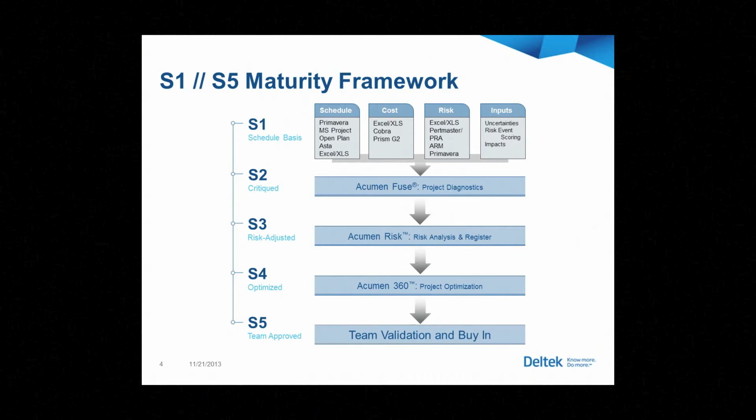Every month as you're statusing, or week as you're statusing your schedule, you can always bring it in and very critique, run it through, get a schedule score, understand risk, update your risks, and see what those impacts are on your schedule.